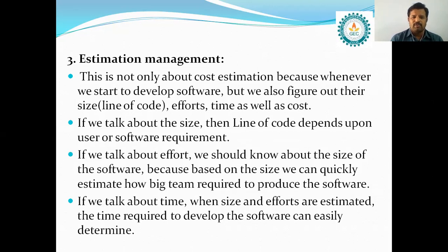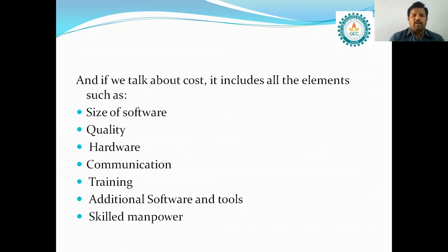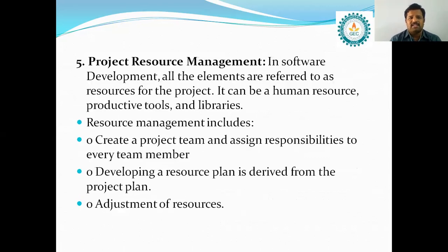If we know about the size and the efforts, automatically based on these two terms, the time required can be estimated very easily, right? And if we talk about the cost, it includes all the following elements like size of the software, quality, hardware, communication, training, additional software and tools, and skilled manpower. If you want to estimate the cost of the project, these are the elements that are required.